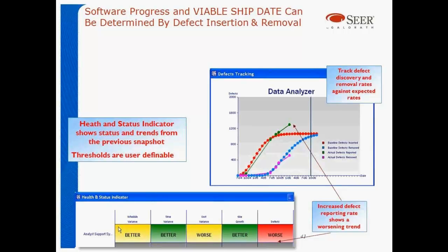You can argue if that's good or bad, but the other line, the sort of purplish line, shows they've repaired fewer than were expected. So we found more, repaired fewer. This project's in trouble. A project manager would want to know that, as would everybody else, and go in and spend more time or more energy on those areas that are getting in trouble. This kind of data can be very helpful to figuring out when a project really is ready to ship and how to manage it best to get it done. Again, this is showing one small piece of it. Multiply it by the hundreds of pieces it had to fit together here. You've got a pretty frightening picture. Next.